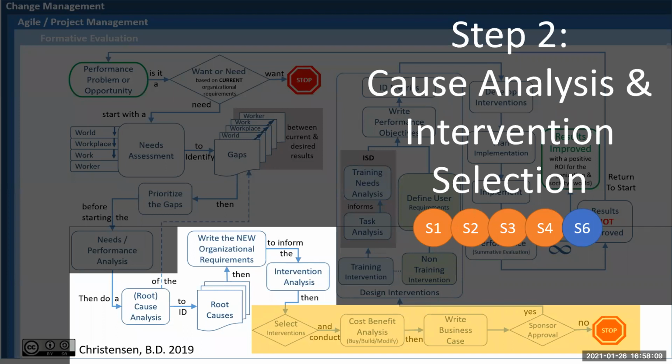for designing, developing, and implementing and sustaining it over the long term. And then once that's all done, you present it to the sponsor for approval. Otherwise, you could get into starting to do that design and development work, and the sponsor finds out and doesn't agree with what you're doing and puts a stop to it. So it's better to get that up front, make sure that everybody's on board with the direction that you're headed.